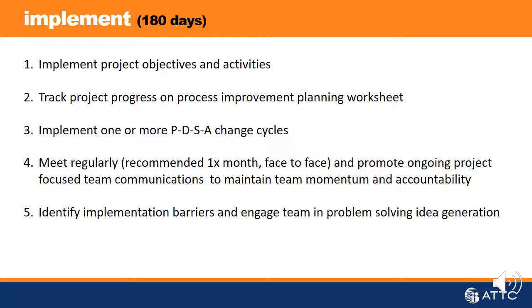With the approval of the team's implementation plan by executive sponsorship, the change team now goes about the activity of carrying out the action steps of that plan. The role of the facilitator here shifts to focusing on maintaining active communication among change team members and monitoring change team milestones. The frequency of change team meetings may reduce during this period to bi-weekly or even monthly, and may make use of virtual platforms.